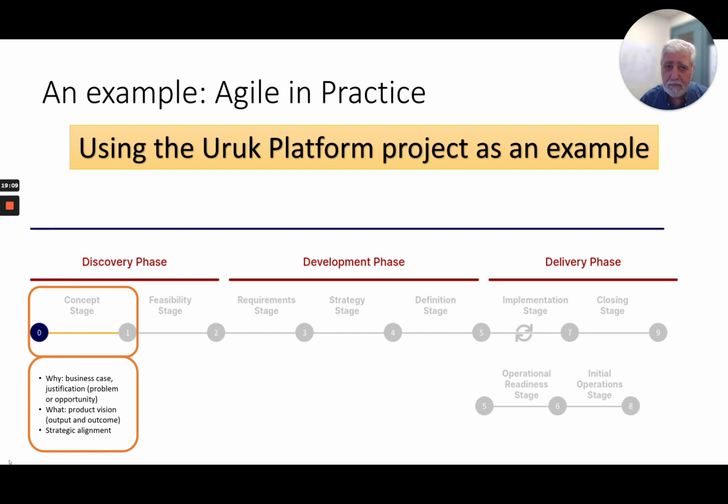And again, the project brief, by definition, the word brief means short. Even on a $1 billion project, we've seen a project brief no longer than 1 page, right? Because we're not talking about product design here. We're not talking about a product roadmap. We're not talking about all that detail.